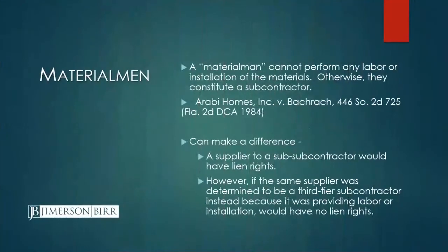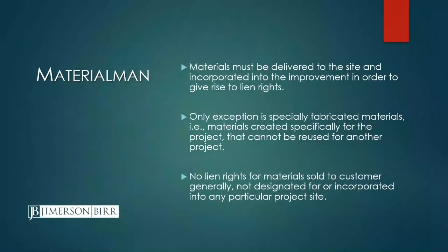One other aspect on that slide relates to equipment. As a supplier, you are entitled to the reasonable value of the period of actual use for rental equipment that's provided to the project. That can be a little bit difficult to determine. But the lien law does provide that the delivery of rental equipment to the site of the improvement is prima facie evidence, meaning again it puts the burden on the owner, that the period of actual use of the rental equipment was from the date of delivery through the date the equipment is last available for use at the site, or 2 business days after the lessor of the rental equipment receives written notice from the owner or the lessee to pick up the equipment, whichever occurs first.